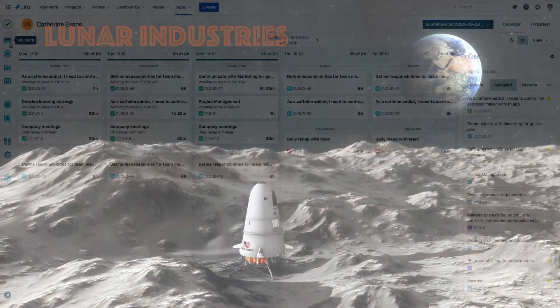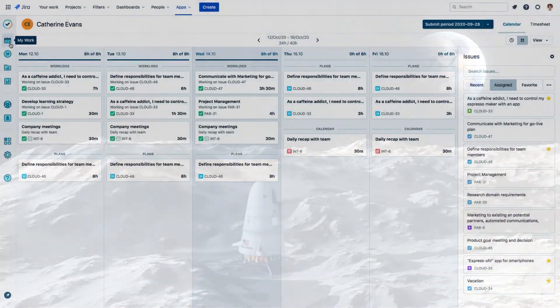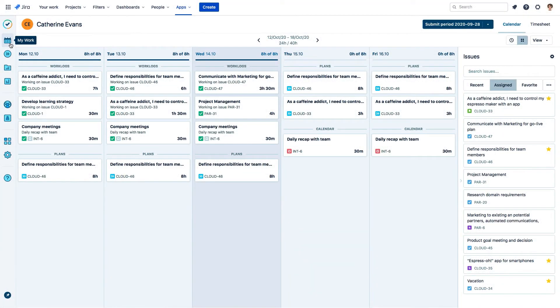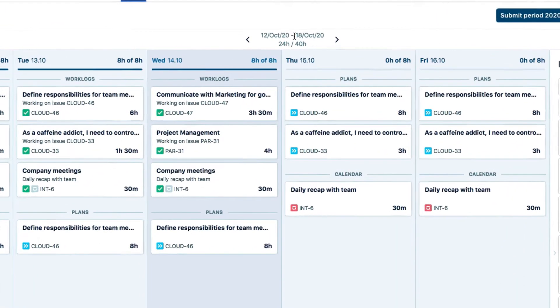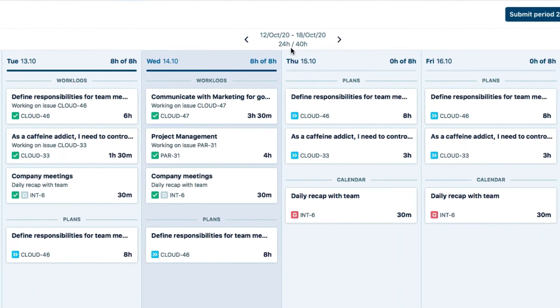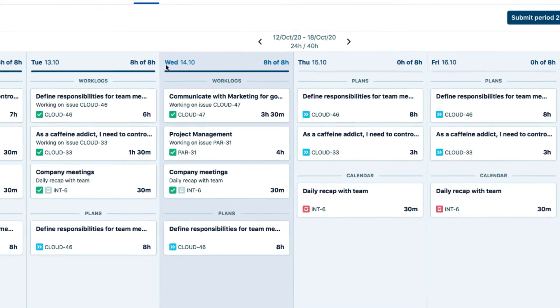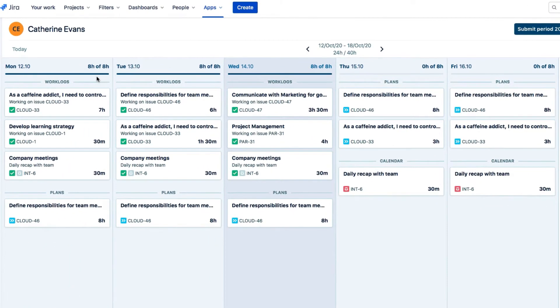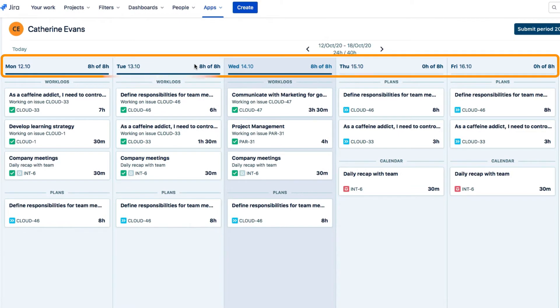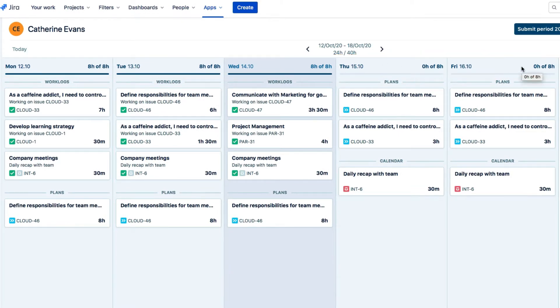Let's first take a look at where these schemes matter in Tempo. In timesheets, when I go to my work to log my time, I see at the top here how many hours I've logged out of the required hours for the week, which is 40. And on each day, I see how many hours I've logged out of the required hours per weekday, which is 8. And that's the workload scheme doing its job.